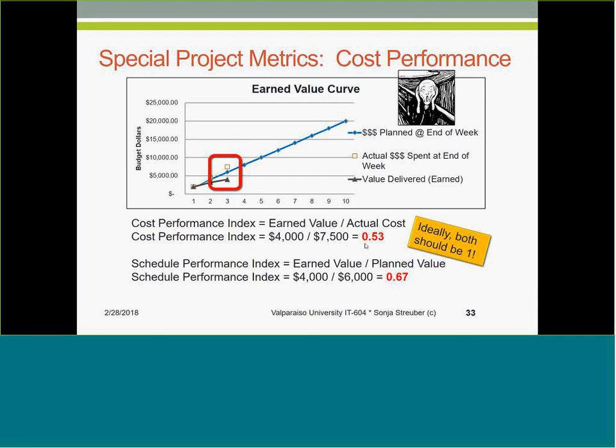At this point, a project manager will have to write a report to explain why this is happening. Now, what are we doing in terms of schedule? Remember, we were supposed to complete 150 laptops and completed only 100. So for that, we can calculate our schedule performance index to determine how bad our situation is. Our performance index will tell us how much we are behind.